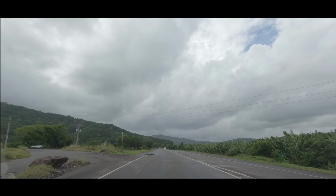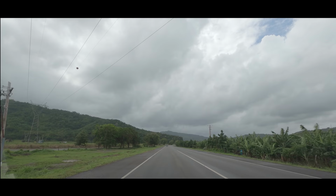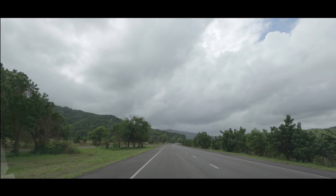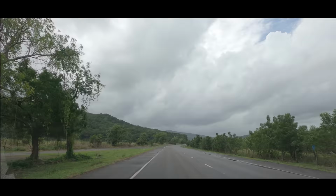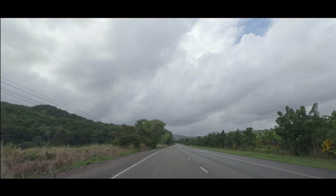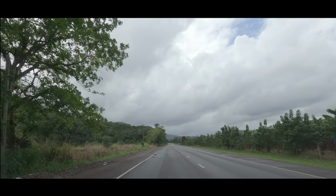The Junction Road Improvement Project begins here, and it involves the widening of the Broadgate to Agualta Vale Road in St. Mary Parish. For decades, the Junction Main Road in St. Mary has been affected by landslides. The Billion-Dollar Road Improvement Project, which has seen widening in some sections, embankments constructed, and paving done, is still behind schedule and has exceeded the original project cost.